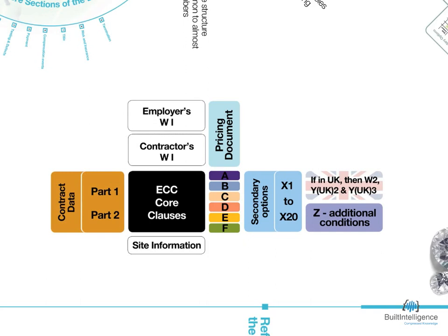The second function is to enable further flexibility. For instance, if following completion of construction, the employer wants a longer maintenance period, or defect date in NEC speak, they just put a different timescale in the contract data, rather than redrafting individual clauses.